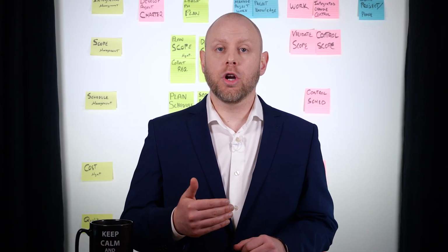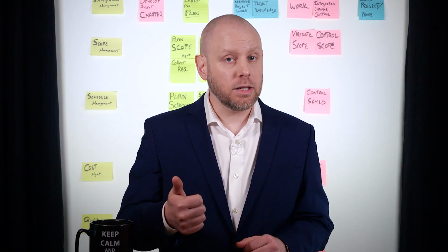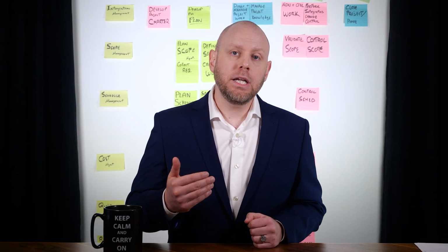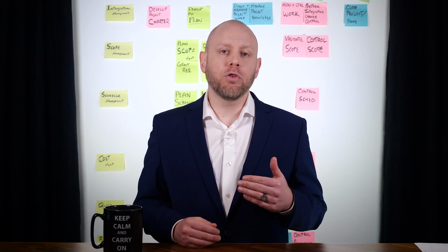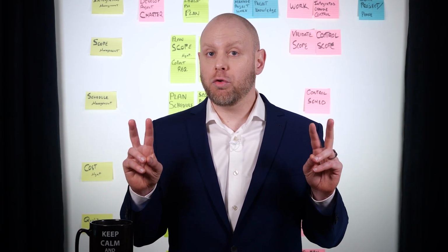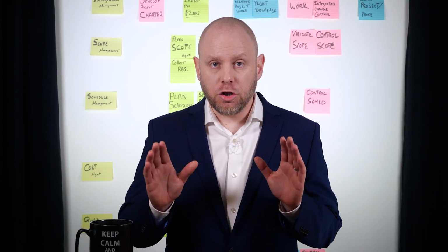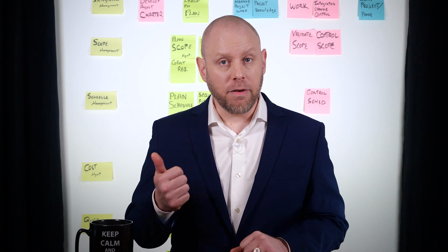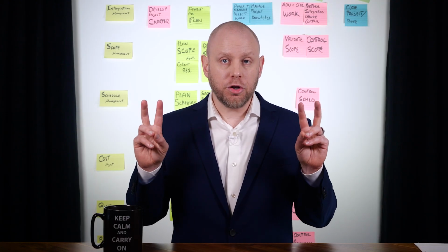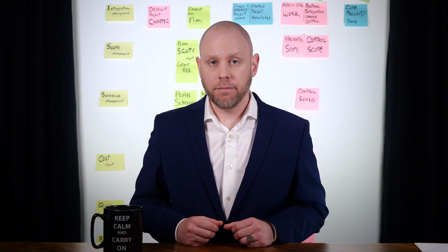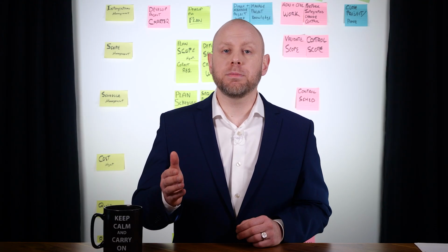As you manage and direct work, you will produce unique results or capabilities to perform a service that are required parts to complete a process, a milestone, or project. As you complete your deliverables, you will update your issues log with any problems, defects, or points of improvement for the next version. This will prompt a change request, a process we will explore in the monitor and control process group. Suffice it to say that a change request is either a corrective action, a preventative action, a repair of a defect, or update to the plan, all in response to an issue or concern raised in the issue log. These changes will require an update to the project plan or updates to various project documents.